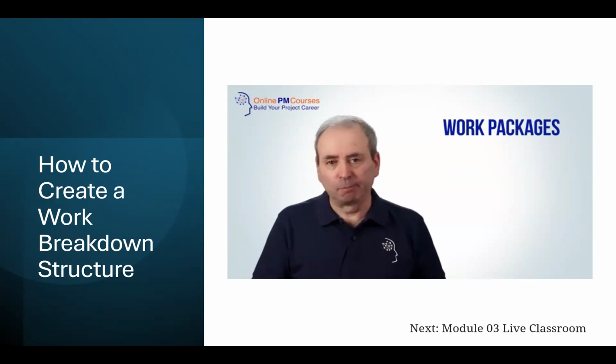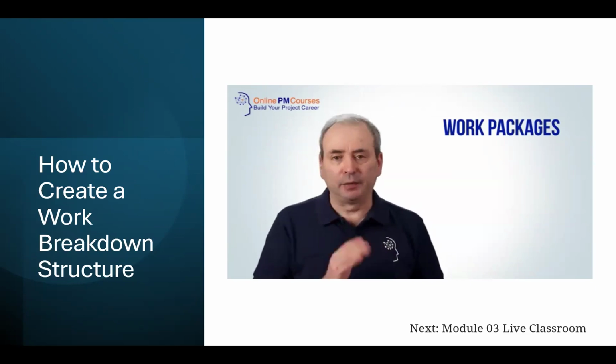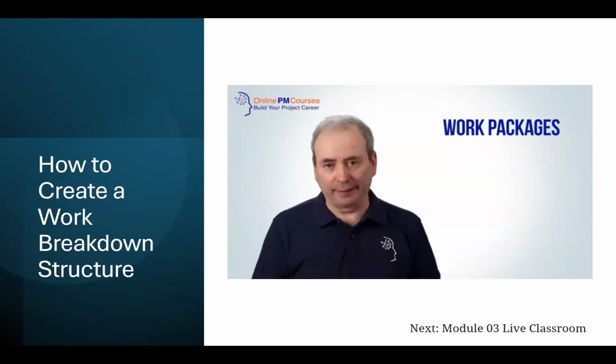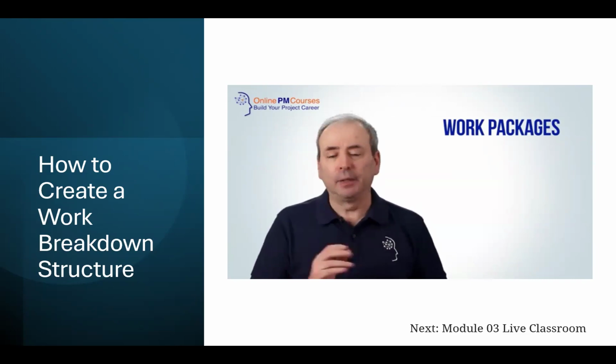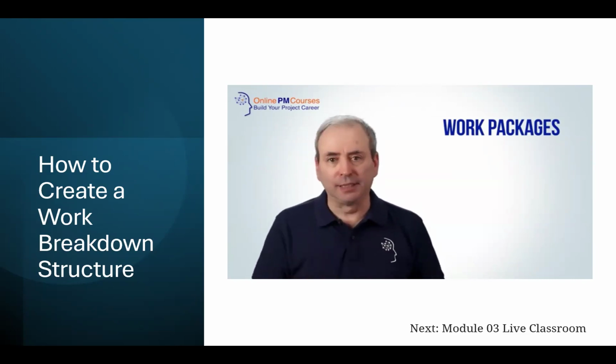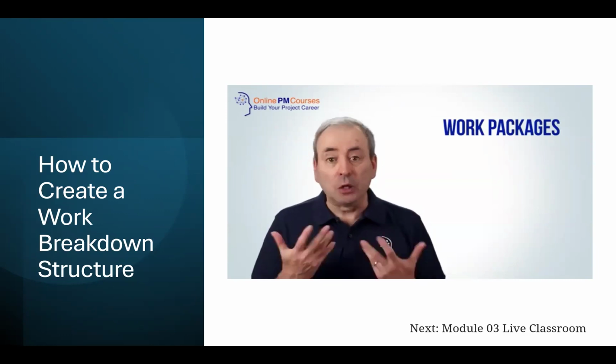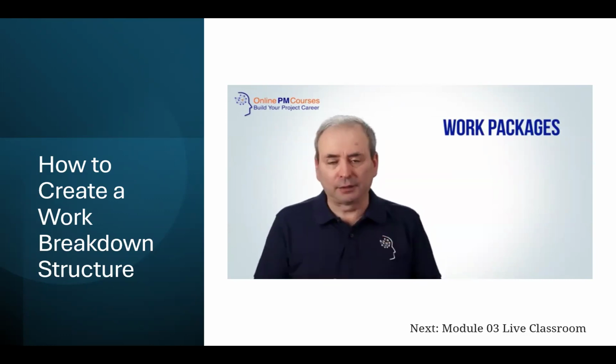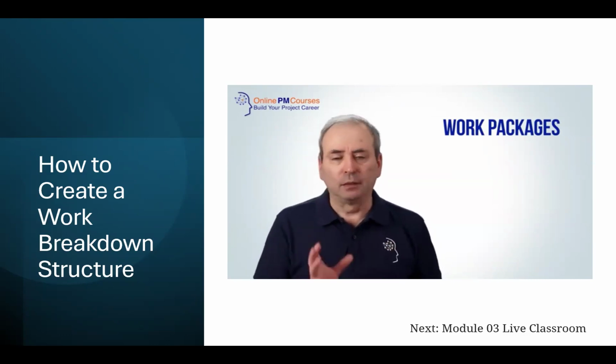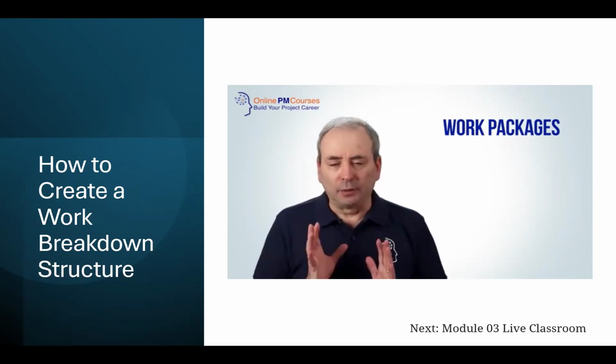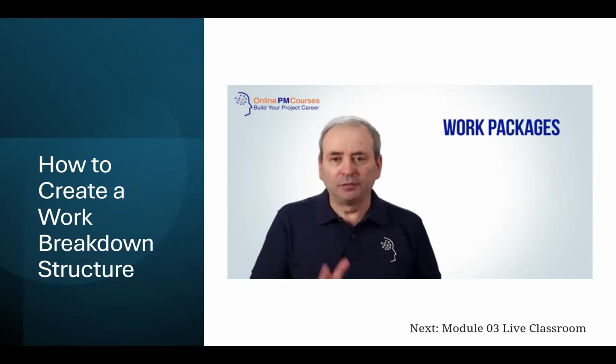Typically, you will have one work package create one deliverable, but that won't always be the case. And also, typically you'll allocate the task of creating this work package decomposition to your workstream leaders who understand the tasks and the deliverables within their workstream better than you do. Once they've created the work packages, they will decompose those into the individual activities that need to be done.